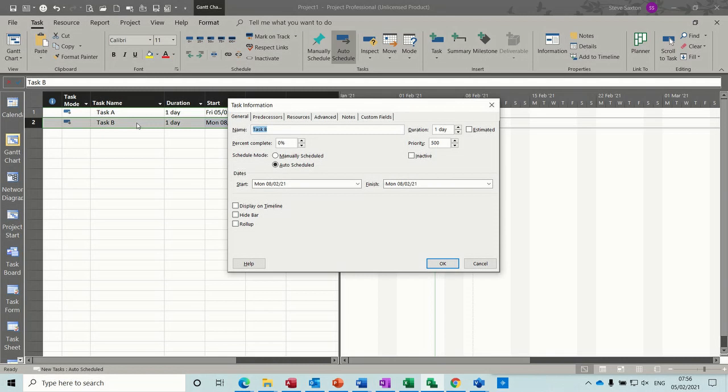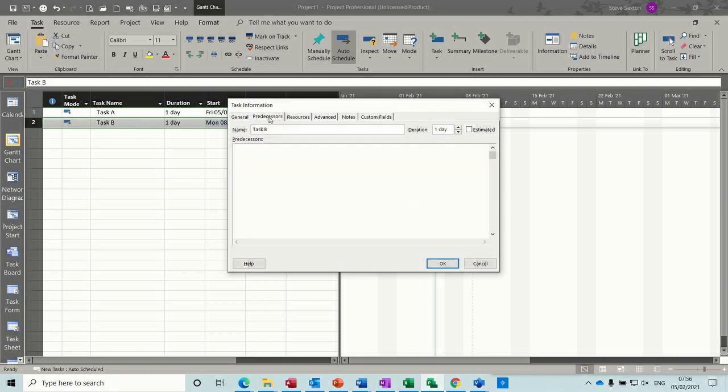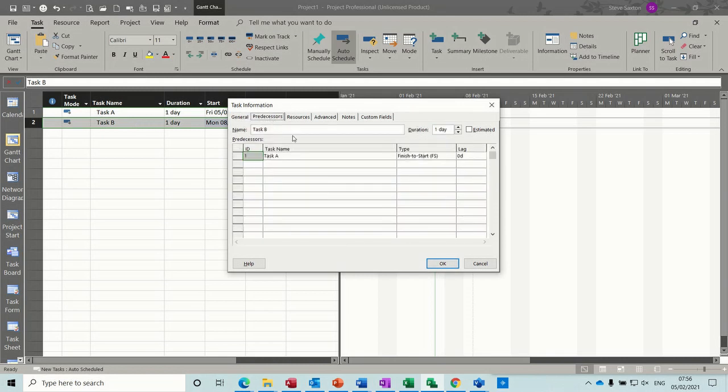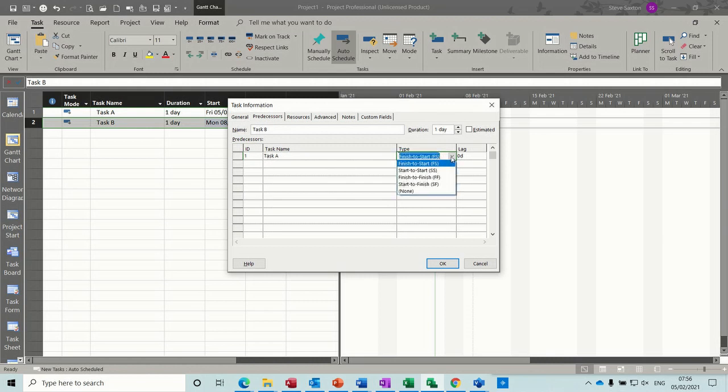and go to the predecessors tab, you have the types in this list here, and you've got the abbreviations at the end, so FS for the default, which you do not need to do if you just tap on a straightforward link,